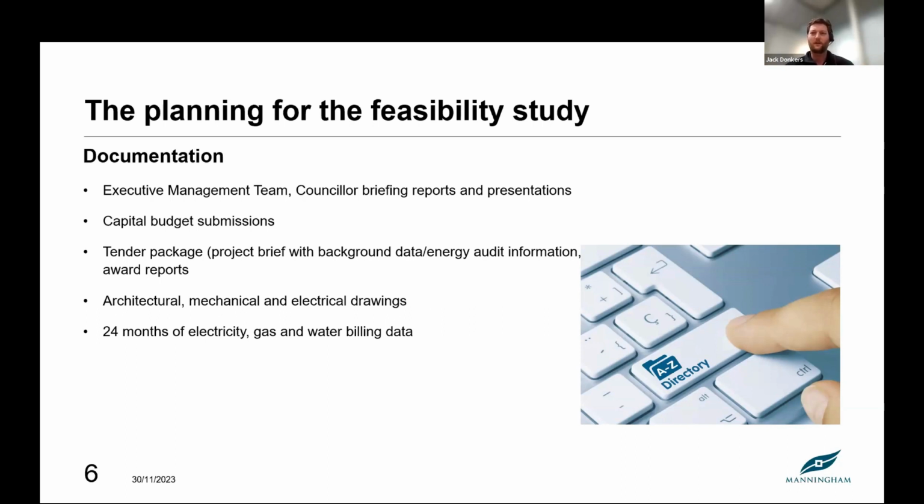And the last thing, which from learnings now I would probably change a little bit, is we asked for the design for the degasification and detailed design of taking out the hot water units and putting in heat pumps. However, realizing now the feasibility to get to that point, there isn't enough information from a consultant's point of view just going around doing a site visit to be able to determine how much that would cost.